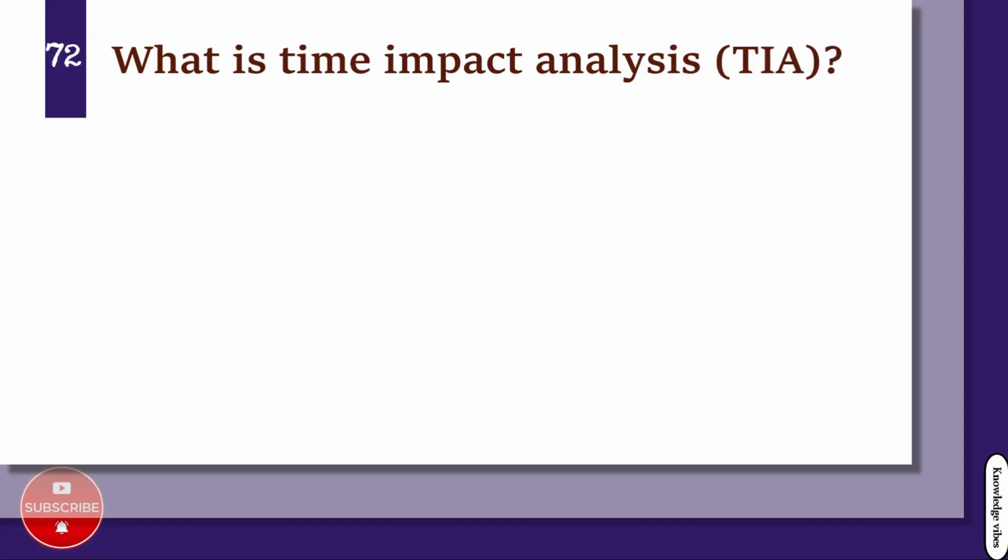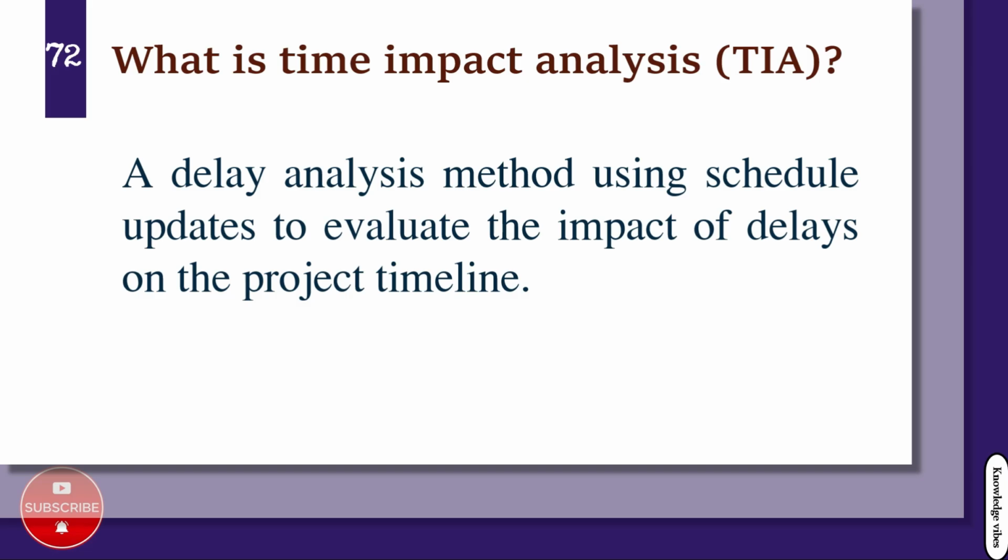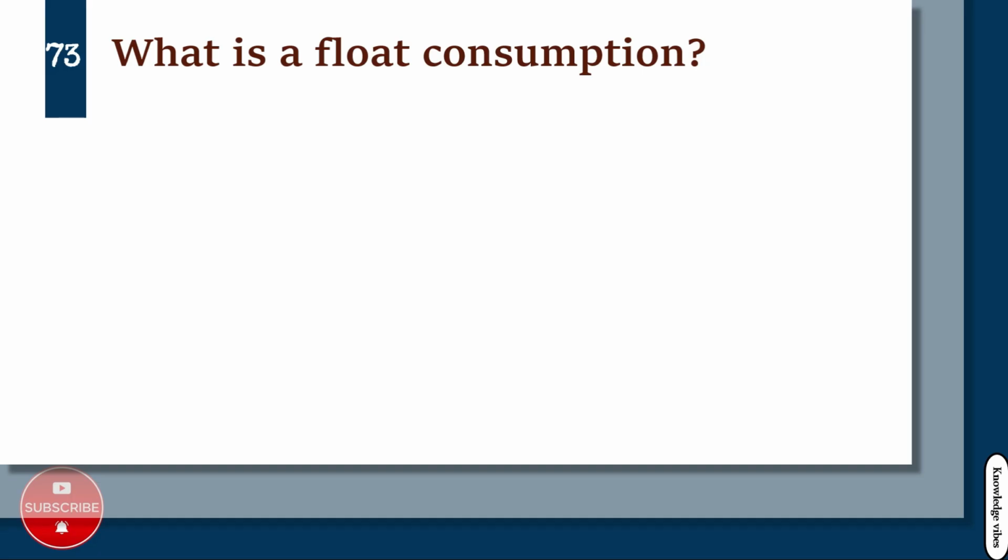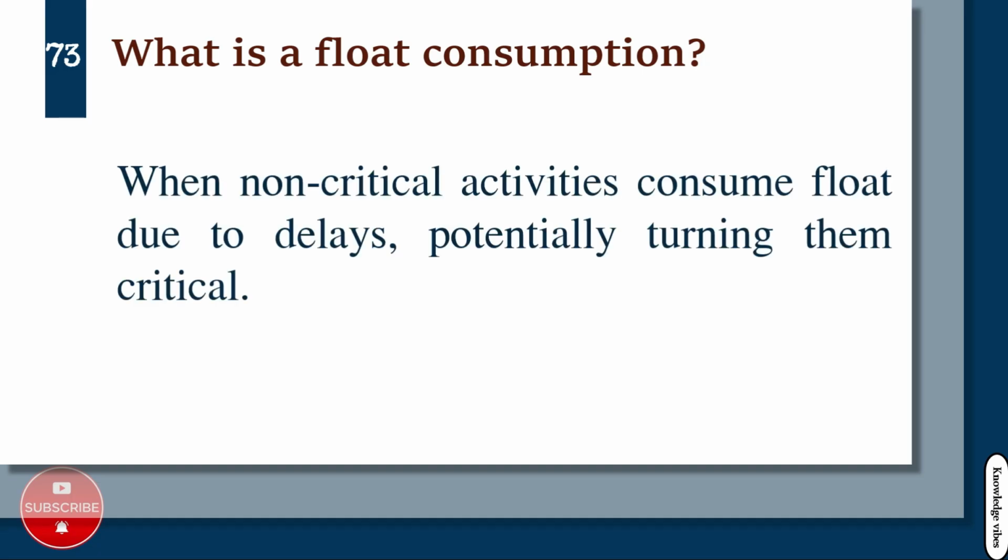What is time impact analysis? TIA, a delay analysis method using schedule updates to evaluate the impact of delays on the project timeline. What is float consumption? When non-critical activities consume float due to delays, potentially turning them critical.